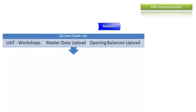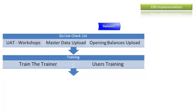We then move to uploading master data to the system and the opening balances upload. The opening balances upload requires coordination between the controllership and financial consultant to ensure integrity between sub-modules and GL. Training follows — train-the-trainer, also called power users or key users — and end users are trained on the new processes and new system functions.